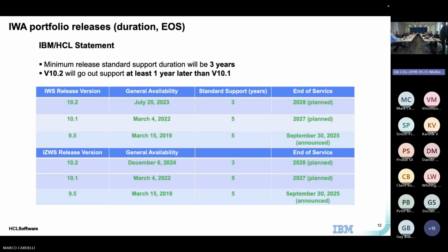For databases, for example, we have to rebuild them for any of the major releases, which is a significant undertaking. And then we've got hundreds of agents that we have to upgrade, each bringing its own individual effort, 500 times over. The 3-year cycle is tight for us. I think it generally takes us 3 years to get through.